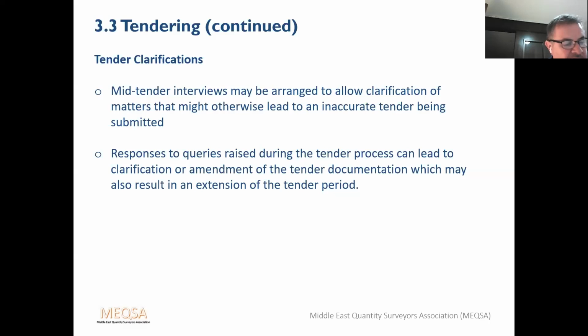It's important that any clarification, additional information or changes to the tender documents are circulated to all of the tenderers to ensure a level playing field. However, this should not give away particular suppliers' proposed methodology, commercial proposals, or programming advantages, which may have been divulged to the client consultants in interviews. Any such information must be treated as confidential.